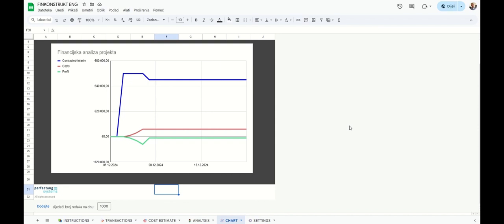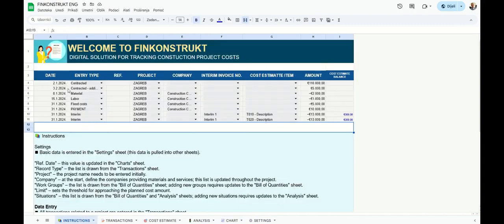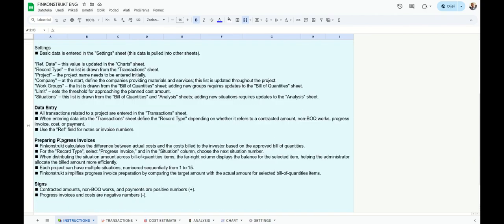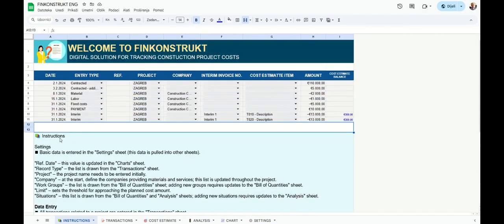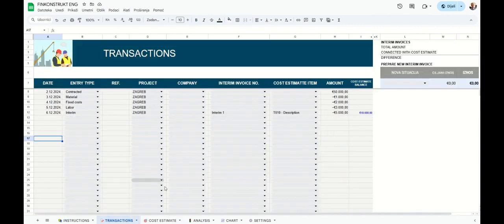Totally. And you know what? They actually highlight a real example in the manual. Oh, really? Yeah, it shows how this Grafika Analyza revealed that the main contractor had to pay for the project themselves for a bit because the client was late on a payment. Imagine all the trouble that could have been avoided. Wow. That's a great example of how helpful it is to see the data visually. It's not just about the numbers, it's about understanding the story they're telling.